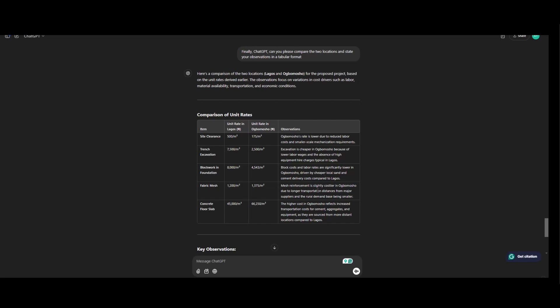Mesh reinforcement is likely costlier in Ubumosho due to longer transportation distances from major suppliers and the rural demand base being smaller. The higher cost in Ubumosho reflects increased transportation costs for cement, aggregate and equipment as they are sourced from more distant locations compared to Lagos.